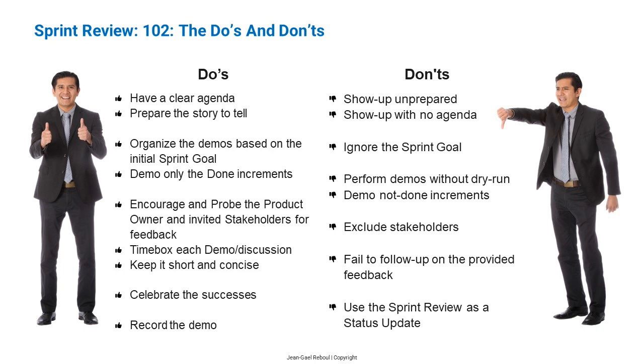And obviously, don't be tempted to demo incomplete work. Even if an increment is 90% done, it's not done. You cannot ship it. So, don't spend time demoing something that cannot be shipped. First, because the sprint review is time-boxed, and second, because you will have time to demo it during the next sprint review, when it's actually done.